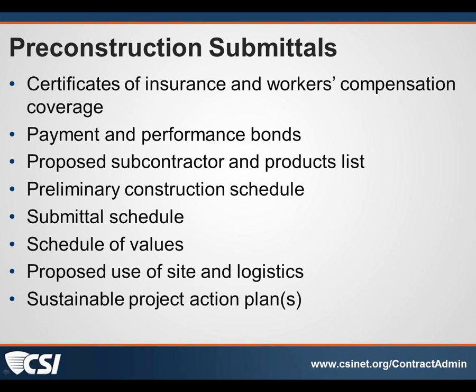So there may be an opportunity, though, to have a preliminary schedule in that process. And many times these are tied to milestones that must be passed in order to process an application for payment on the job.